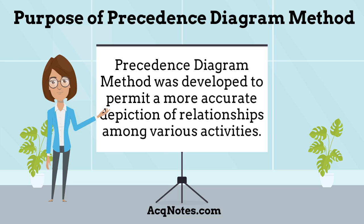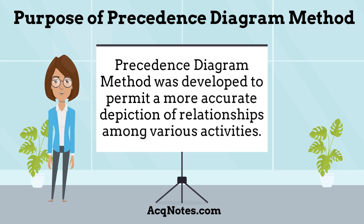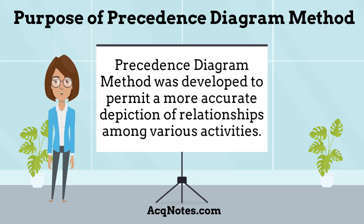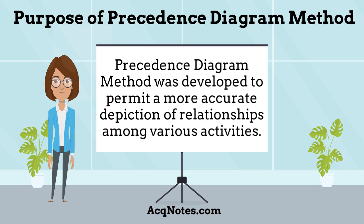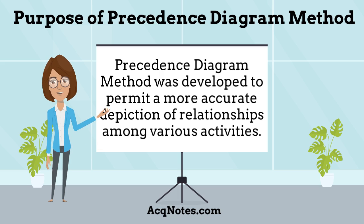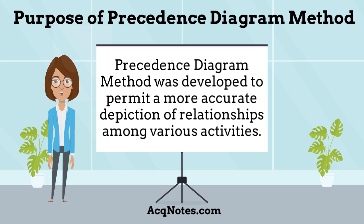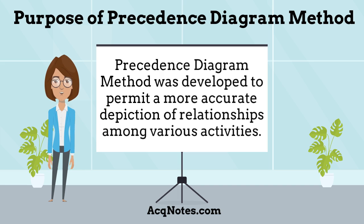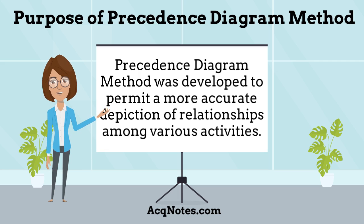What is the purpose of the precedence diagram method? The program evaluation and review technique, PERT, and critical path method, CPM, techniques are essentially limited to finish-to-start relationships — basically, activity B cannot start until activity A is completed. PDM was developed subsequent to the PERT and CPM techniques, and its function is to permit a more accurate depiction of relationships among various activities.